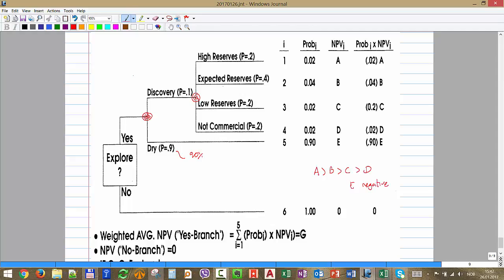So you see, you have to make the tree for yourself for every situation where you think you require a decision tree. If you have a decision, or if you have something with a finite number of possibilities, then you have to use a decision tree. Okay? And you have here one decision and two chance nodes.